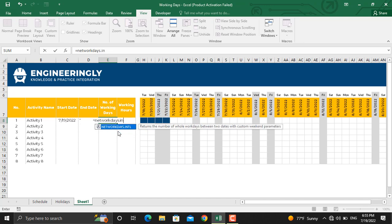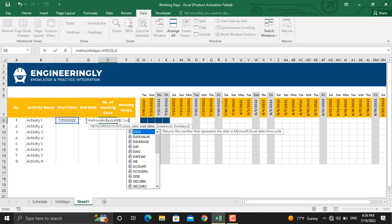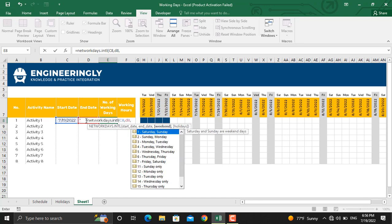I'll write down INTL. In here, I'll open parenthesis. The start date will be this date, comma, the end date will be this cell, which is D8, so I'll write down D8, comma.